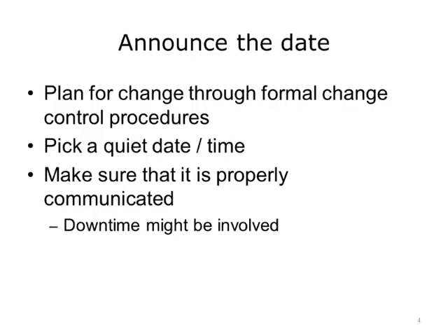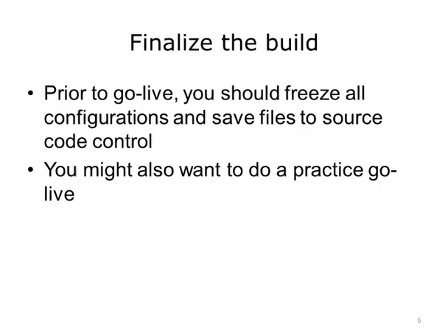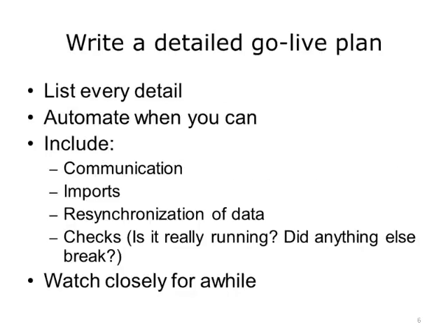Interfaces are very important, so downtime of interfaces can be very disruptive to operations. Plan carefully. Before going live, make sure you know all the configuration items that are part of the change and save copies of what you plan to change. You might even want to do a practice go live, in which you turn on the feeds from a production system but point them to a test system and then analyze the results. Again, planning is crucial and go live is a team effort.